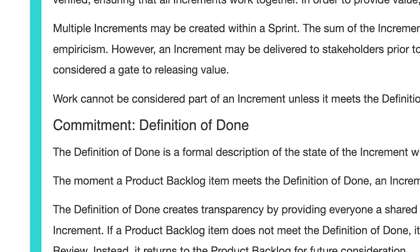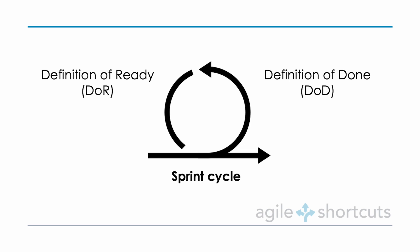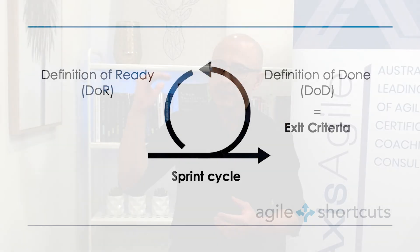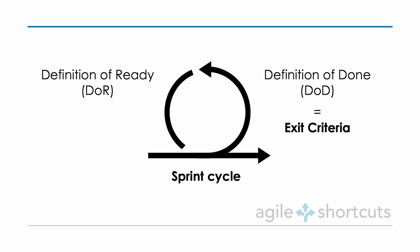Don't confuse the Definition of Ready with the Definition of Done, which is part of core Scrum, appears in the Scrum Guide, and is not optional. The way to describe them is that these two artifacts sit on either side of our sprint cycle. The Definition of Done specifies the exit criteria — the quality that needs to be met for something to exit our sprint cycle. The Definition of Ready, on the other hand, specifies the entry criteria.